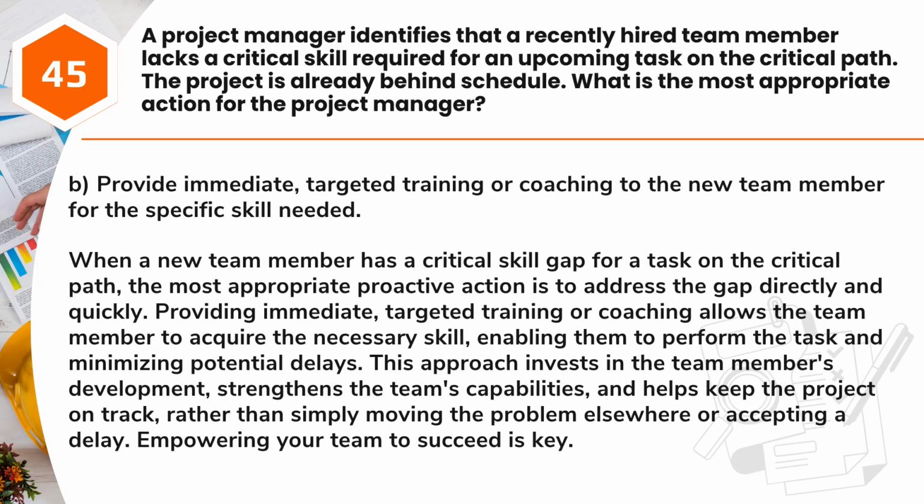Answer: B. Provide immediate, targeted training or coaching to the new team member for the specific skill needed. When a new team member has a critical skill gap for a task on the critical path, the most appropriate proactive action is to address the gap directly and quickly. Providing immediate, targeted training or coaching allows the team member to acquire the necessary skill, enabling them to perform the task and minimizing potential delays.